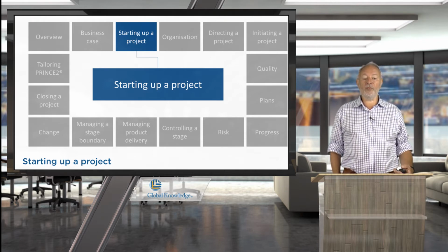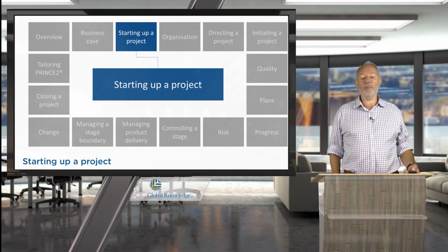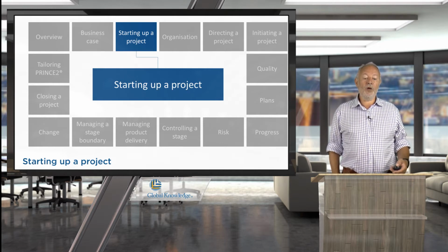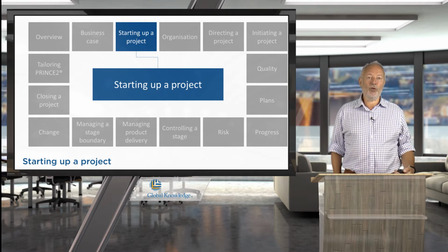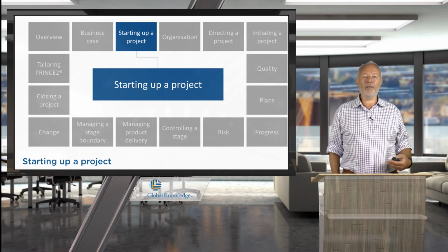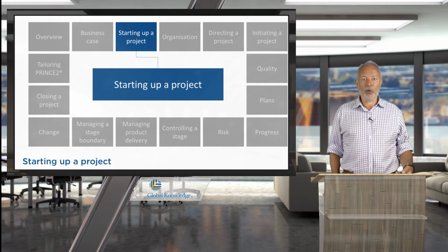Starting up a project process is, as you can see, the first process that we're going to be coming across in PRINCE2. Note that this process is before the project starts. So we're going to be carrying out a little bit of PRINCE2 before the project begins. And the main reason for this, of course, is to ensure that we have a viable, achievable and desirable project.